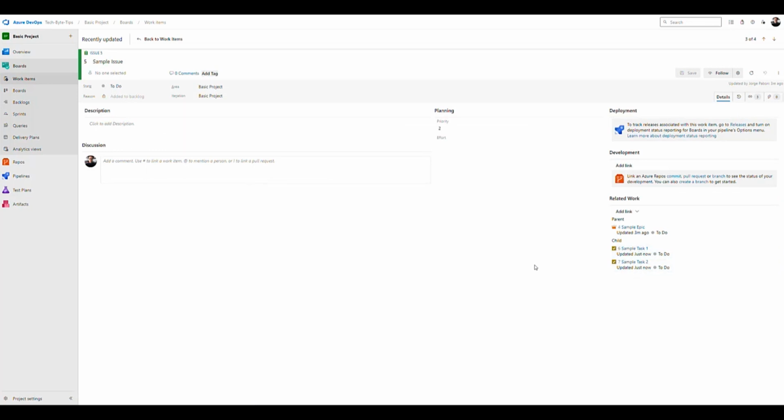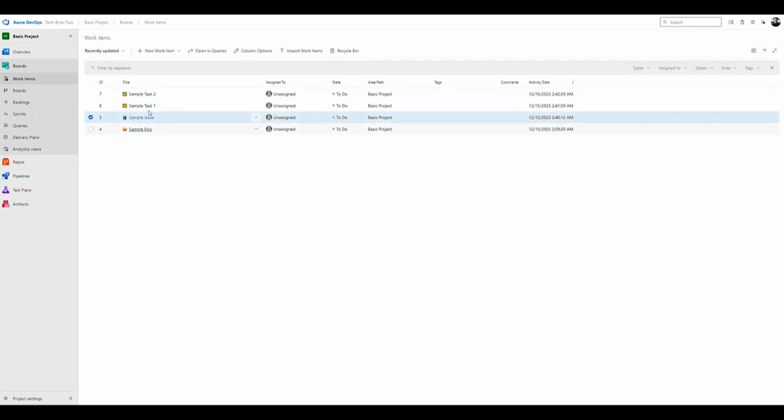Normally the tasks are populated when the sprint is active and going, so normally you wouldn't be putting tasks in the backlog. So you would leave only the epics and the issues mainly, and then once the sprint starts, the people that have the issue assigned can create those tasks to organize the work.